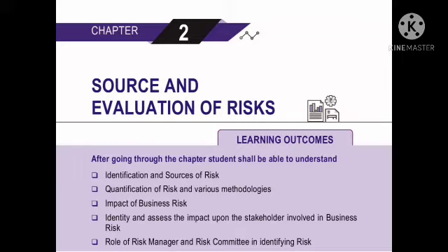In similar fashion, failure to include intangibles in this calculation can severely distort the result by equating a small loss with a high probability to a large loss with a small probability. The expected monetary value is generally used as input to further analysis, for example in a decision tree, since risk events can occur individually or in groups, in parallel or in sequence.